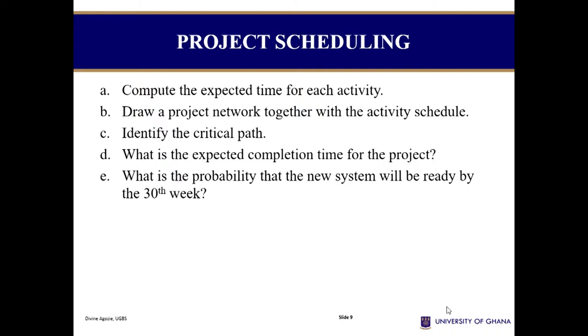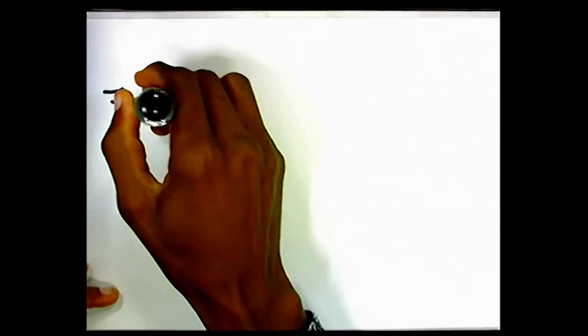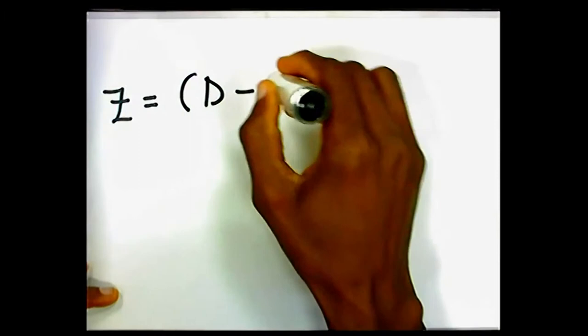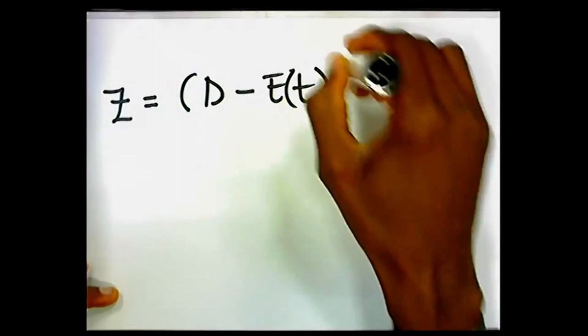The last part is asking us to find the probability that we would complete our project in 30 weeks. Like we said, this has to do with an issue of probabilities. And we said we would have to convert this into standard form where we say our d to our expected time.